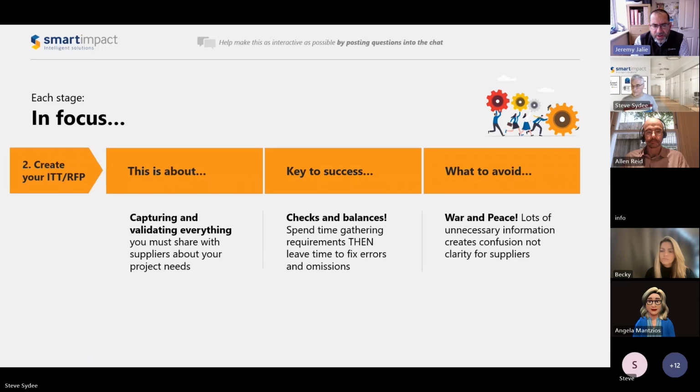That quite often happens, because that's what people experience in the day-to-day. So try and strip out things like that. Perhaps apply a framework like MoSCoW or a nice-to-have, need-to-have analysis to requirements. In terms of line by line items, I really would try and keep it thematic and really focused on things that you absolutely need to have.